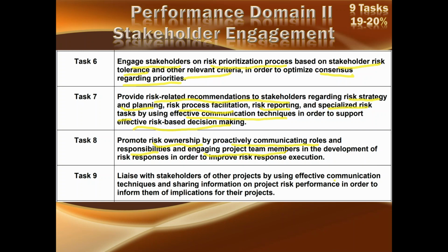In the development of risk responses, naturally, these people who will be working on that risk must also be working on development of the risk responses in order to improve the risk response execution. So this team who will be responsible, there must be an owner in the team. This team who is responsible for this risk must be responsible for identification of the risk, the development of responses for the risk, and for the execution of the risk responses. So this task number 8 is basically promoting the risk ownership.